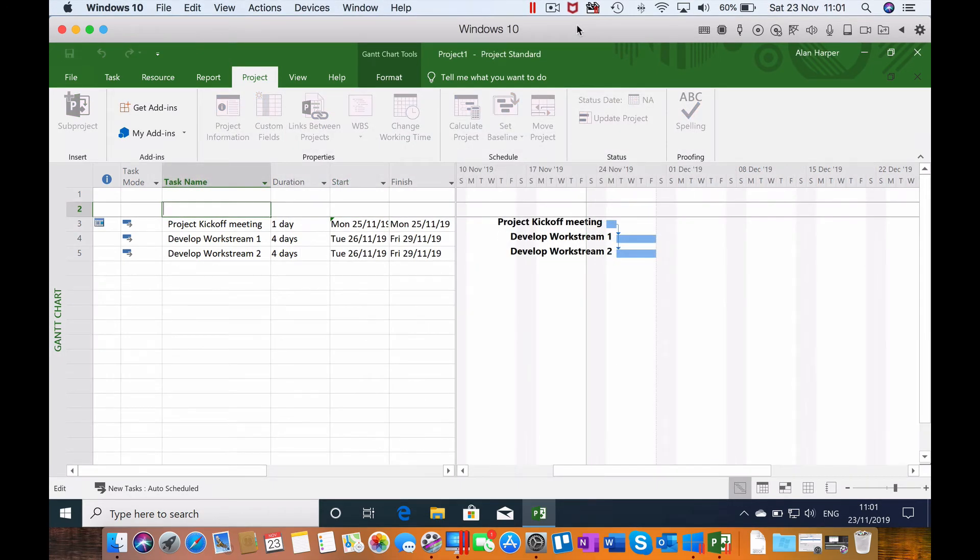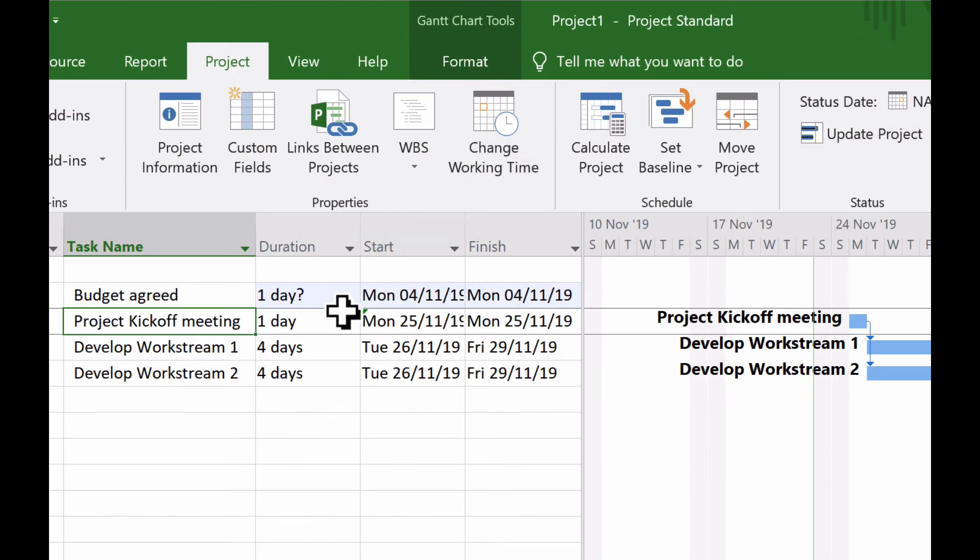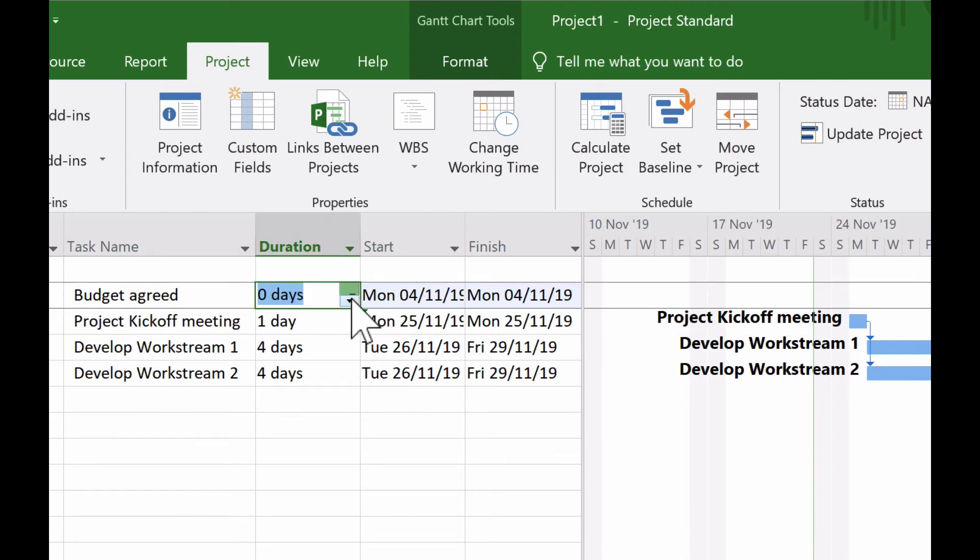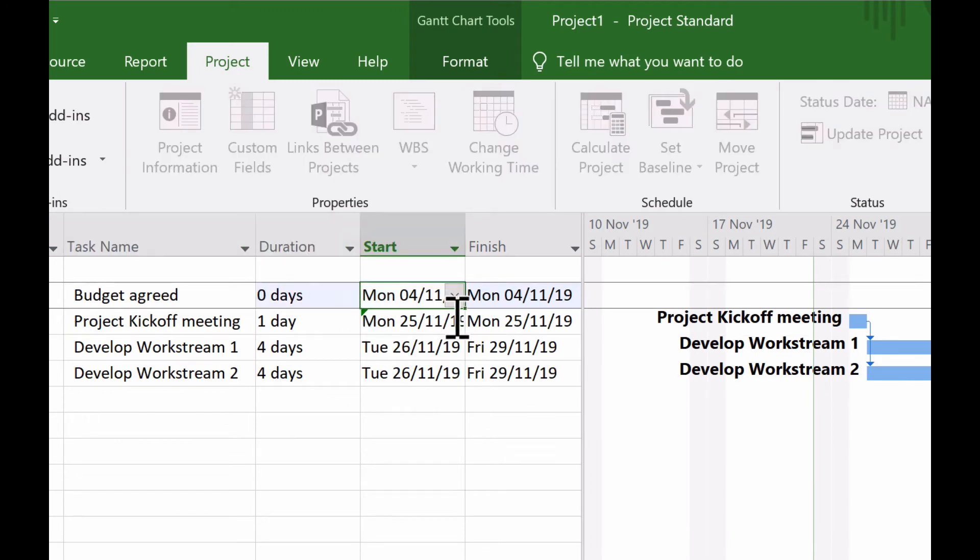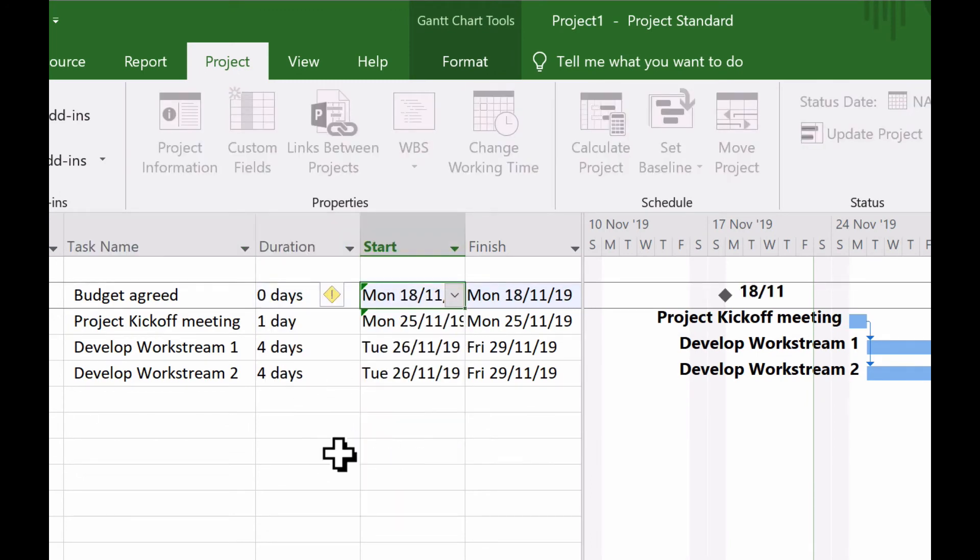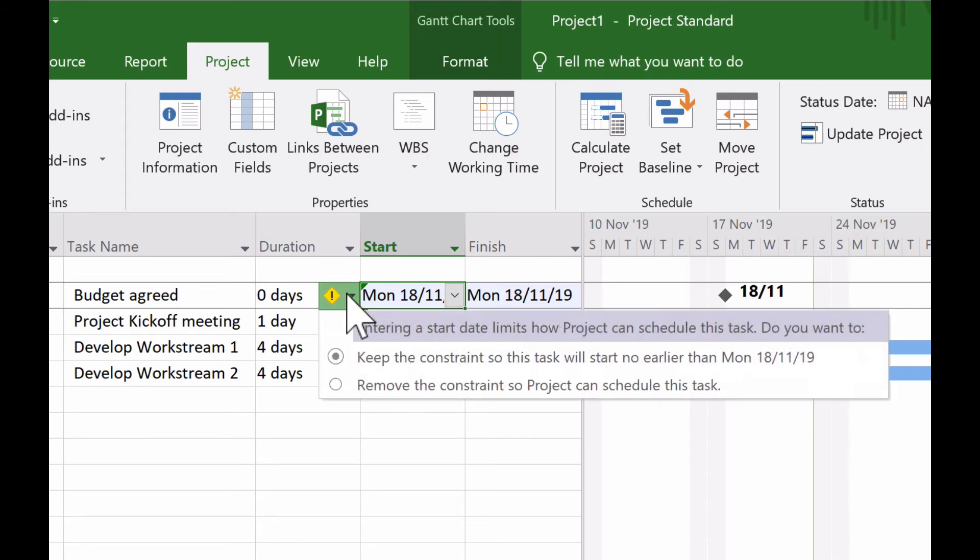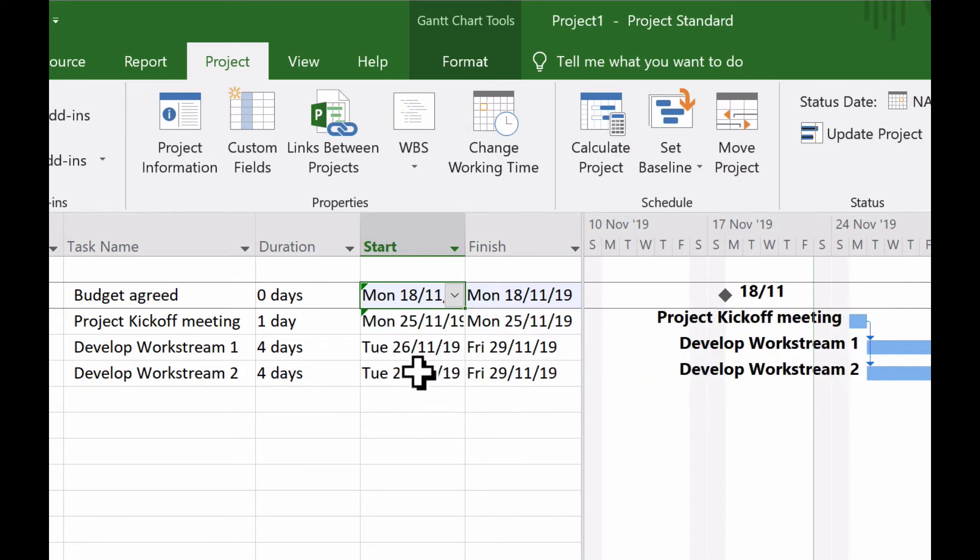So let's try inserting budget agreed again. It was a milestone, and it was previously on the 18th. Now sure enough, there's no complaints from Microsoft Project about starting early. We do get a warning message telling us that we've set a date which doesn't allow Microsoft Project to control the date as much as it would like to, but that's OK, we'll keep that constraint.